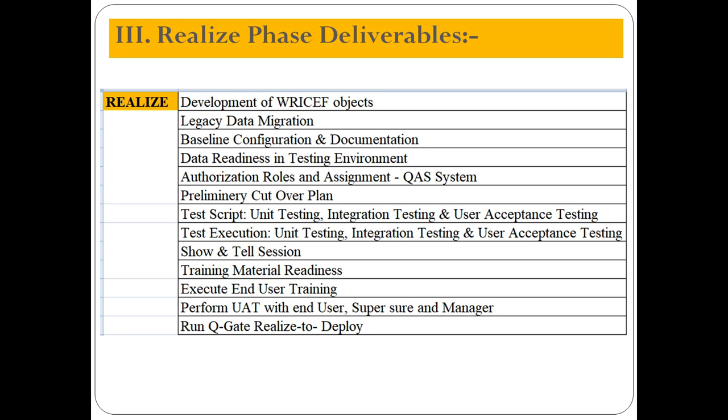After that confirm the production order, then receive the final product from the production order, then delivery to the customer, post goods issue, then customer invoice and payment receipt. So this I'm telling is one process. Like that, for integration testing there will be a minimum of 20-30 processes.